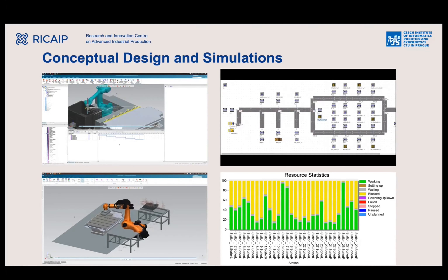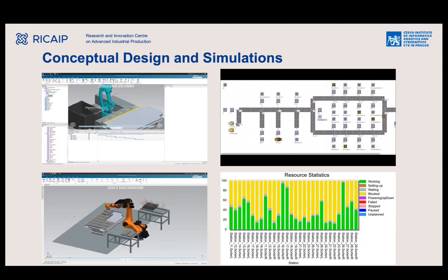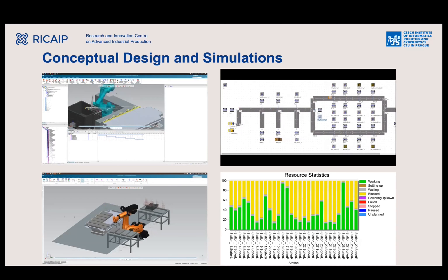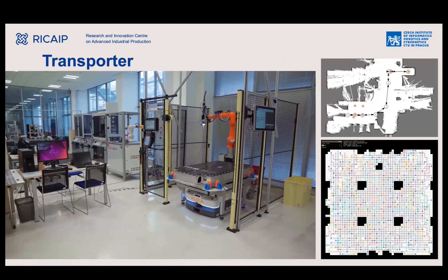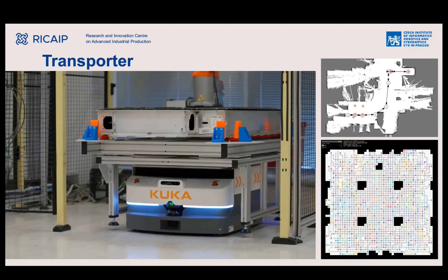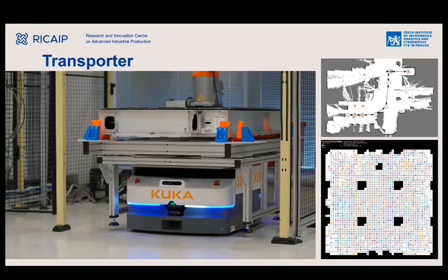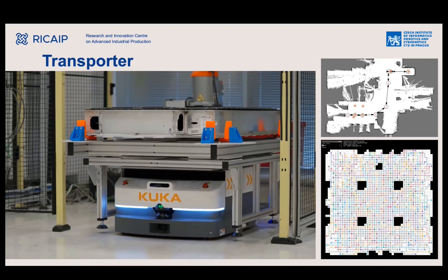After this analysis, we designed the first concept for how the process can be split into automatic and manual operations, and combined in an easily configurable way to handle various battery types. We did capacity simulations to estimate how many robots we need to meet production demands. After approval of the first phase we started preparing physical demonstrators — including a robot transporter that moves batteries between various workstations.